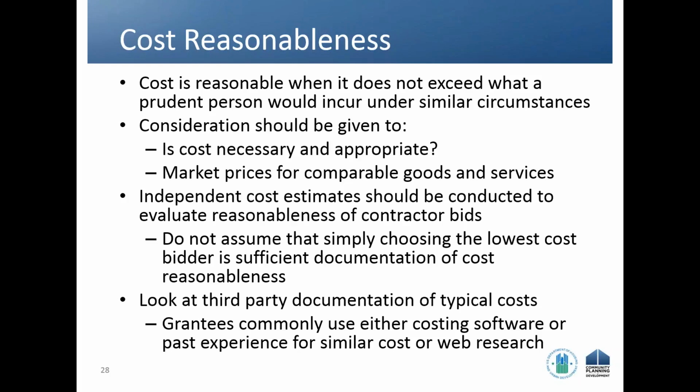And that in-house cost estimate is often done by an engineer or an architect or a planner or someone who knows something about what these items typically cost. Sometimes it's also done by a contractor. You could hire out for someone to do that cost estimate for you. But there have been monitoring findings for grantees when they have failed to do an in-house cost estimate prior to issuing. So do an in-house cost estimate.